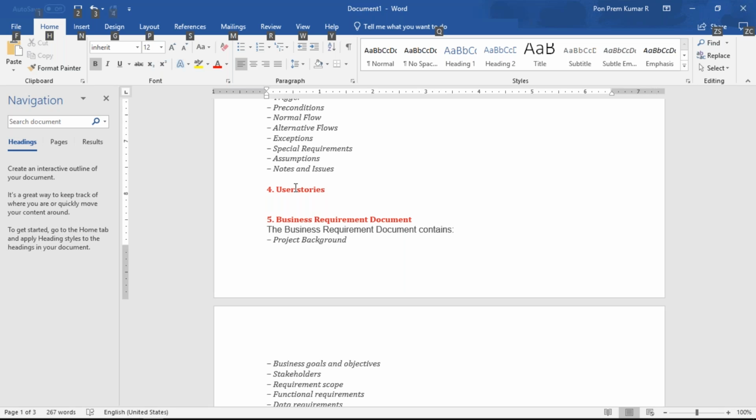But with user stories, the work is divided into multiple user stories. So continuously, for the first 2 weeks they'll be working on the user stories. Normally within 2 weeks you'll be completing user stories. For the next 2 weeks you'll be validating the previous user stories which were delivered by the development team. You have to validate before putting it into the master. Master is the main application.